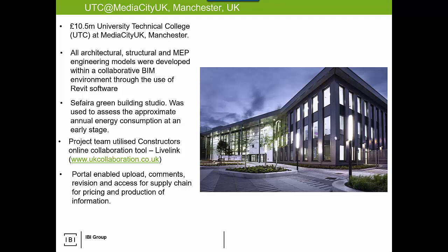Who's tracking the deviations from the site, and as they feed back to the continuing design that's happening in parallel? All very important. Simple example: I'm pouring a concrete wall. The form shifts, or the wall shifts. I dig it over a foot by mistake, a meter, whatever. I've got to tell the architect that, hey, that wall is now in a different spot so that the building can be reflected accordingly. Very simple.